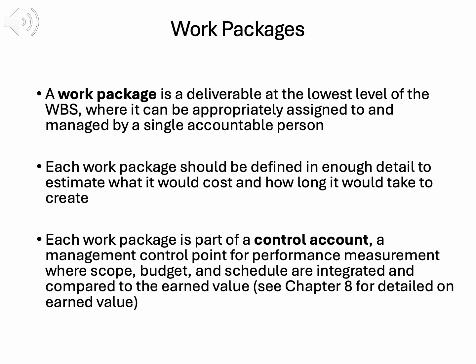Work packages are part of a control account, a management point where scope, budget, and schedule are integrated and compared to earned value. This allows performance measurement, ensuring the project stays on track. For example, the survey work package's costs and timeline are tracked against its budget, identifying deviations early.